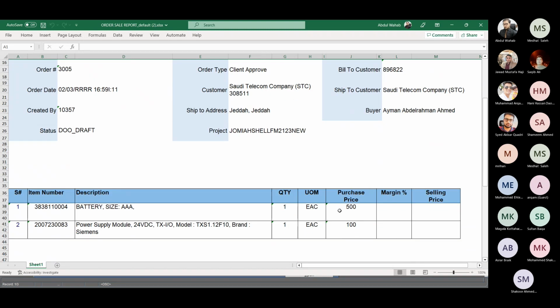Now it's updated. For example, this is coming by default here, that this is 10% margin. It will show you 2 times 10%. This contract we already mentioned that we have to sell them by 10% margin. So what you will do, just equal this 10 divided by 100, whatever you will get, multiply by this price plus this price. This is your sale price.